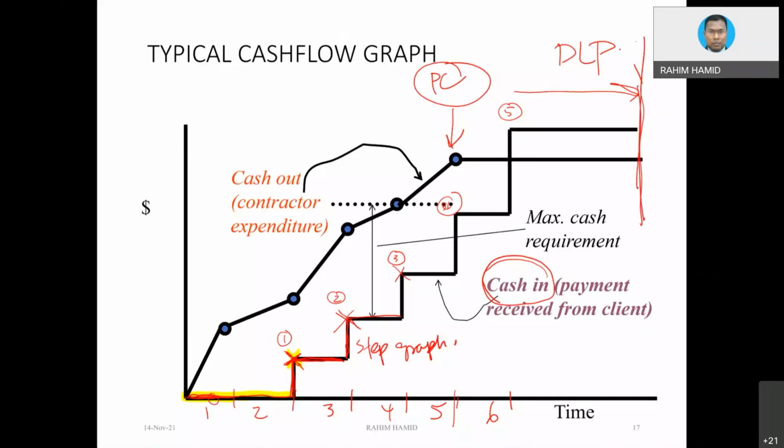So being a contractor, actually, if you understand the concept of cash flow, most of the time you are not going to have extra money. Maybe for the entire project, I would say, if for instance you have the retention fund, and then you have all kinds of things related to payment issues, you are going to get your money most of the time maybe very, very late, until encroaching on the defect liability period.